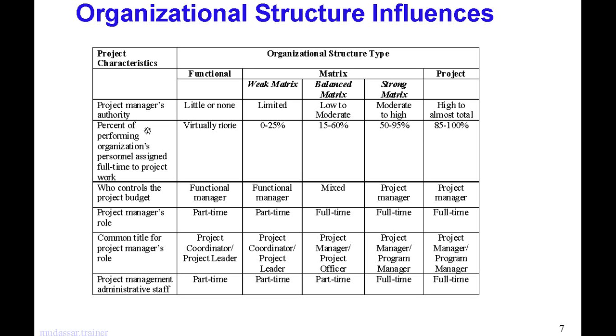The percentage of the performing organization's personnel assigned full-time to the project work. Virtually none in this case. But in this case, it's almost 25%. In this case, almost 60%. In the strong matrix, it can go up to 95%, and definitely if it's a projectized organization, the personnel are dedicated resources for the projects only.